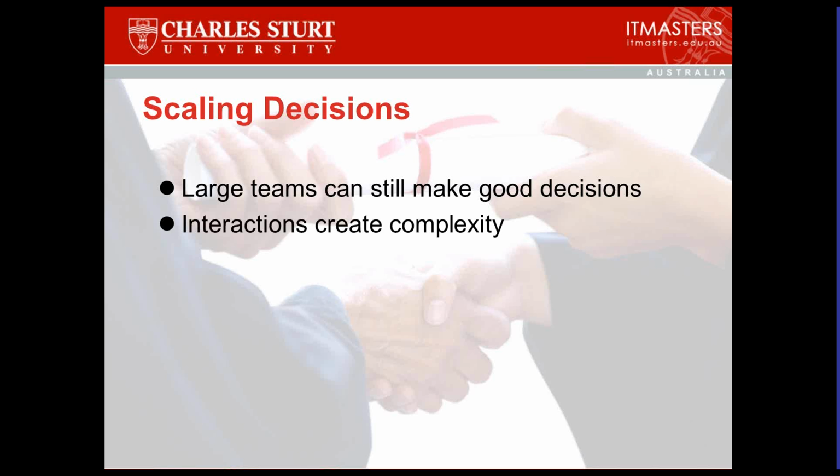When we have too many interactions, we create complexity. This is why, for example, we don't have the entire production team, development team, working on what's happening in wave 2 and wave 3. Because that's an interaction complexity, because an individual person is interacting with many pieces of information to feed into decisions. We want to minimize the number of pieces of information that they need to get in contact with to hold in their head at any one point in time by limiting the number of decisions they need to make to only the decisions they need to make.